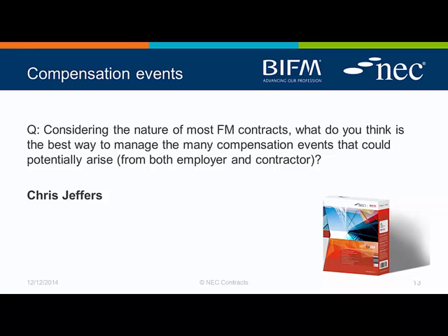So, you know, might you be better in some instances by having just a purely cost reimbursable contract? If you envisage an absolute cascade of change, then I don't think a lump sum contract will help you there. I don't think a target cost contract will help you there. Maybe the schedule of rates type approach might be applicable, providing these additional services are in keeping with the original schedule of rates. But maybe if you're also using a cost reimbursable contract, that may not be to some people's appetite, if you like. But you know, lots of change isn't good. It isn't good for anybody. Any thoughts on that, John?